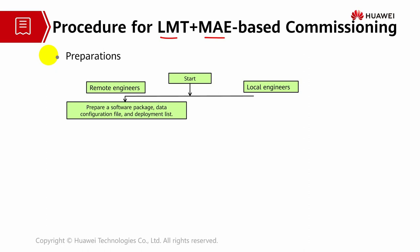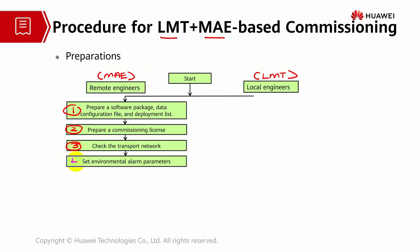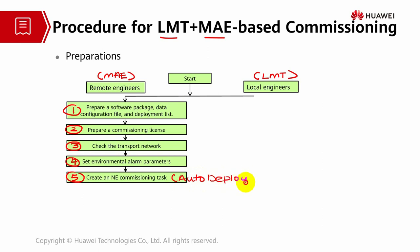Remote engineers will have to prepare a software package, data configuration file, and deployment list. They also need to prepare the commissioning license. Remote engineers will be using the MAE platform, while local engineers will be using the LMT platform. The remote engineer also needs to check the transport network, set environmental-related alarm parameters, and create the commissioning tasks using auto deployment under the SON — all part of the MAE access platform.